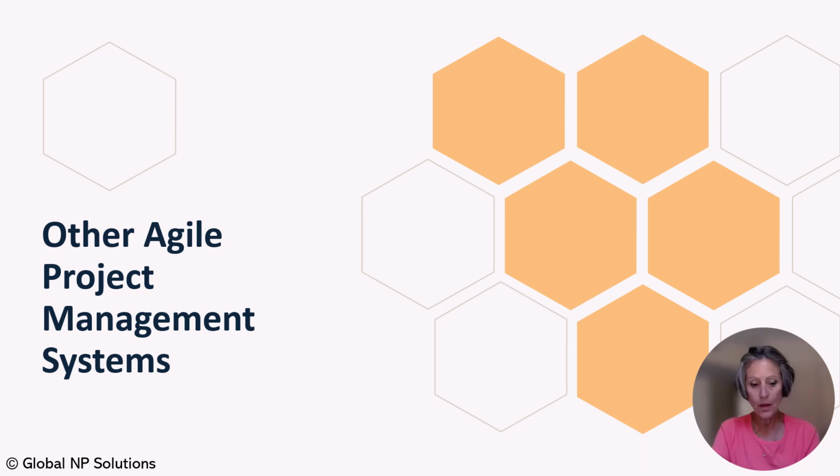Project complexity is implied by team size, so Crystal offers scaling that is often not immediately apparent with other Agile methods. Crystal Clear, 1 to 6 people. Crystal Yellow, 7 to 20 people. Crystal Orange, 21 to 40 people. Crystal Red, 40 to 80 people. Crystal Maroon, 80 to 200 people. Crystal Diamond and Sapphire, very large teams.